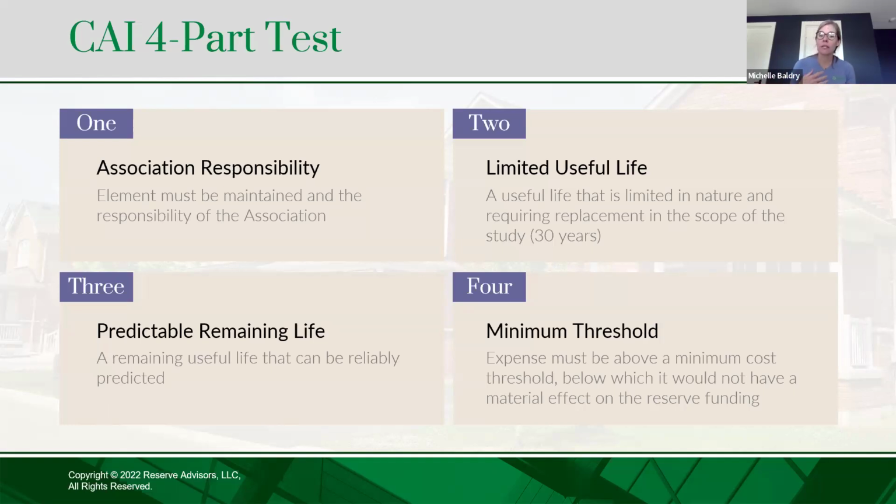So what a transition study, or a defect study, does is look at all of the components relative to their age and puts together a report or punch list of concerns so that the board can go to the developer and say, hey, before we accept ownership of the community or as part of the negotiations for ownership, we want these items fixed because these are not in good condition relative to the age. So developing communities often will have both a transition study and a reserve study done in conjunction at the same time. Mira, is there anything else I can describe about that?